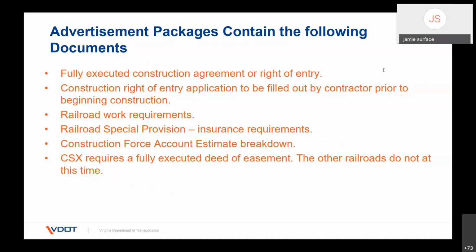As Debbie mentioned a minute ago, CSX is now requiring a fully executed deed of easement for bridges over the railroad. So that's got to be fully executed prior to advertisement as well. At this point, the other railroads do not need to do that. Next, please.